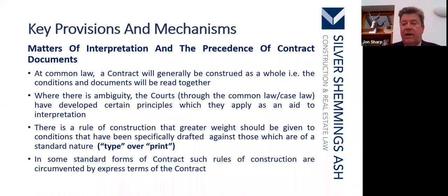But no matter how carefully a contract is drafted, there is always going to be some ambiguity. And it's the court's or the adjudicator's job, with the use of common law and case law, they have developed certain principles which they apply as an aid to interpretation of a contract. So, there is a rule of construction that greater weight should be given to conditions that have been specifically drafted against those which are of a standard nature.